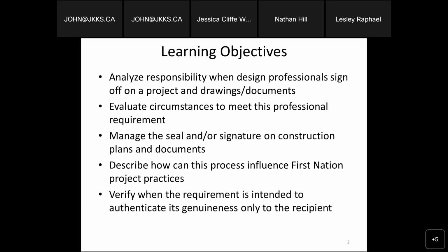Perhaps not. There are legal guidelines dictating which projects need an architect's involvement and sign-off, and others that can be reviewed and stamped also by an engineer. Typically, most every large project, particularly when it comes to occupancy in assembly type categories, requires an architect or an engineer to sign off on the construction drawings.